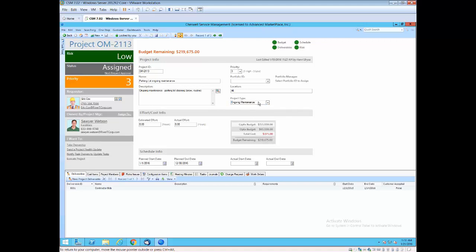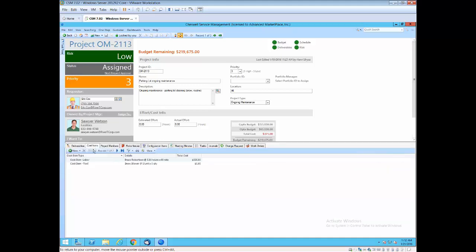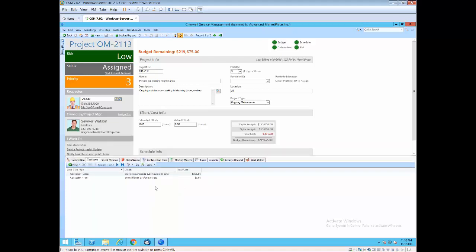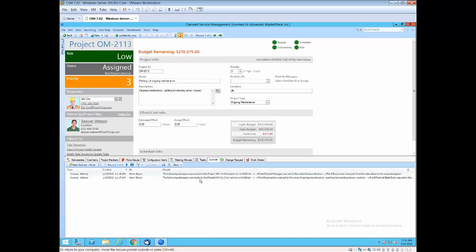In the project you have a workflow, you have somebody who requested it, and you have a project manager. You have cost, you have your budget, and you have a traffic light kind of reference up in the corner that tells you when these different areas are green, yellow, or red. The areas that you can track in the project include deliverables, cost items, and cost items are really important because you're able to add them up and debit them against the budget in order to get the health of that. So in this case I have a labor one and a tool one. Project members are evaluated and kept in with the project. You can identify risk and issues, meeting minutes, tasks, journals, lots of different really important areas of a project.